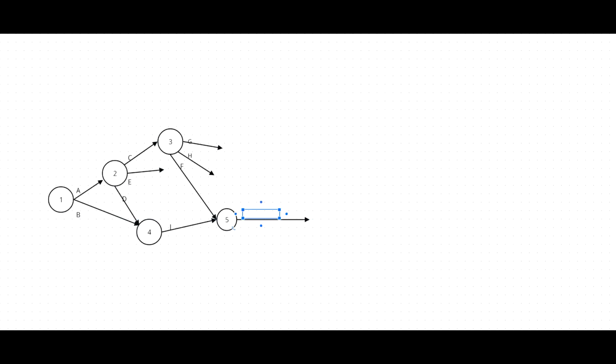The next, L. We should complete E, H, G, K. There are four: E, H, G, K. The problem is that G and H start from the third event, while K and E start from separate events.